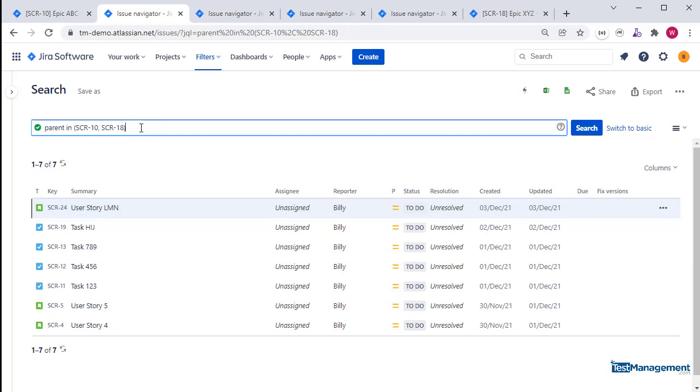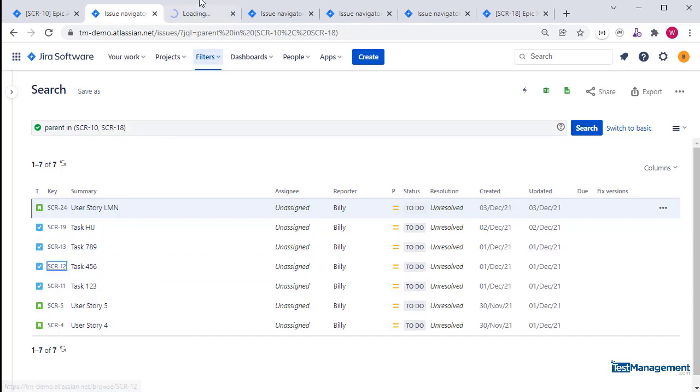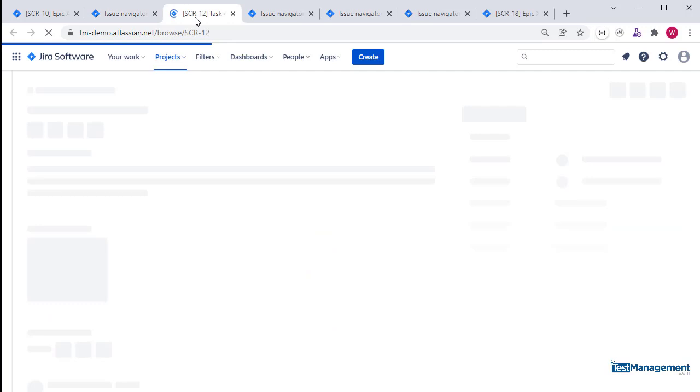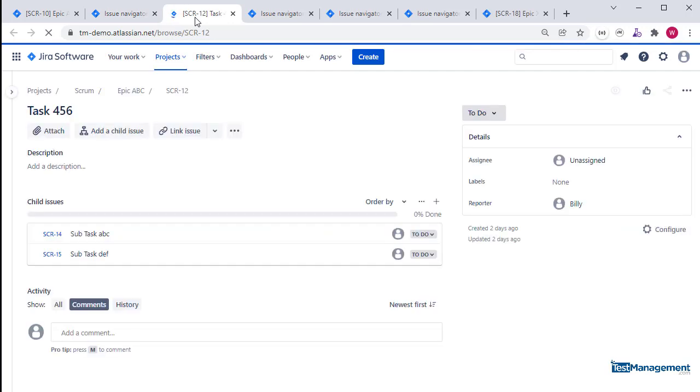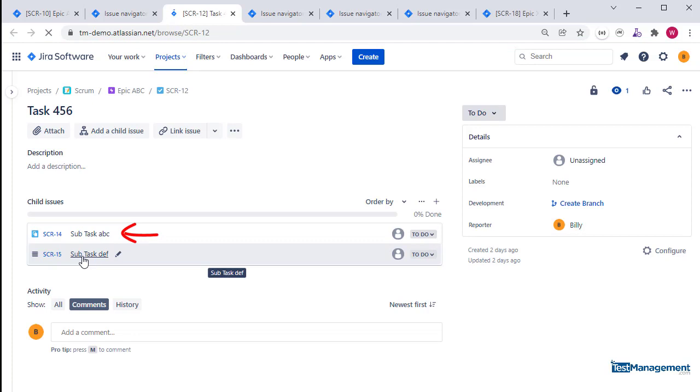Note that SCR-12 in this instance contains subtasks underneath the task itself, which is underneath the parent. This search will not pick up those subtasks. Jira and JQL does not support that capability out of the box in the cloud.